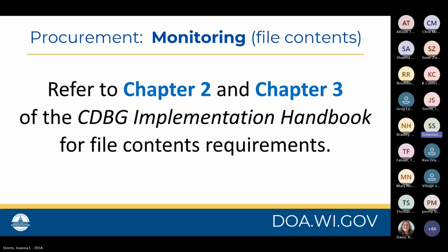In preparation of the project monitoring, procurement-related documents may be located in several subfolders of the CDBG project file, such as procurement and contracting, labor standards, equal opportunity and semi-annual reporting, and financial management. At the time of contracting, it is helpful to obtain the required information from the prime contractor and from its subcontractors as contracting occurs. Additional information such as Section 3 reports, weekly payrolls, and supporting documentation from your contractors and subcontractors make the monitoring reporting process orderly and more simplified.